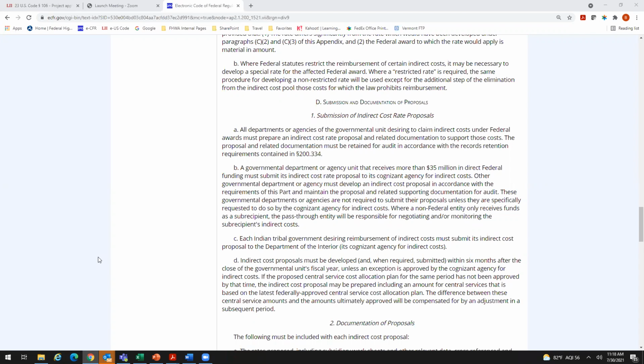My example yesterday, when there was an earthquake in Alaska, they should not charge their normal indirect rate to those ER events because it would cause them to overbill indirect costs. Unless they can show that their indirect costs significantly increased due to this ER event, it may not be equitable to charge their rate to a FEMA project that they weren't expecting to have because it was an emergency event.